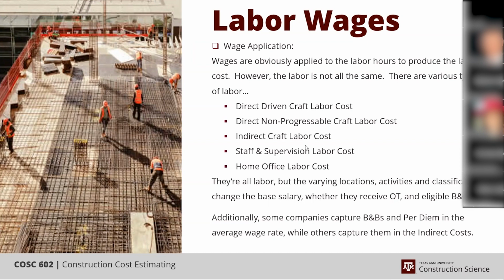Not all wages are the same. You have direct driven craft, direct non-progressible craft, indirect craft, staff and supervision, and home office labor. Even though it's just people working and getting paid, the salaries and the conditions around those salaries are all different. Your direct driven craft are those directly installing the permanent materials. The non-progressible direct crafts are those participating in the installation of the permanent materials, but in an indirect manner, like a crane operator.